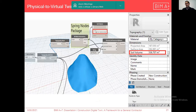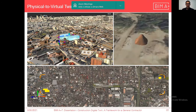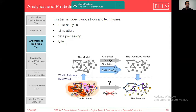A Dynamo module and Revit add-on were developed to calculate the soil volume, so relevant stakeholders can see the soil volume in real time. In many cases, the excavated soil must be transferred outside the project location, so it is necessary to integrate the BIM models with geospatial platforms such as ArcGIS and InfraWorks in order to do optimization regarding selecting the optimum routes.